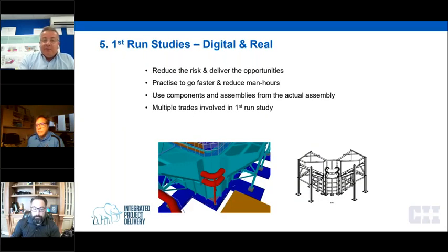Then a key lean principle is to run first round studies. I worked with Glenn Ballard a long time ago, and he was absolutely adamant that you need to get these first round studies done and put into practice what you're planning on doing, see the issues and the faults so you can learn and improve. So absolutely critical. Next one, please.